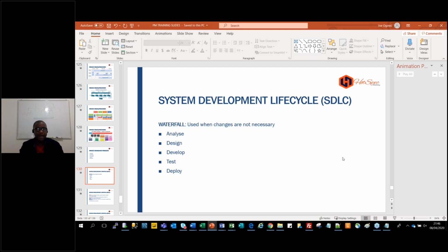Now, sometimes you're sure of an existing system. I'll give you an example. TikTok is an application a lot of people are using now. They did an application on Android, and they want to do it on iOS. They already know what to do: just replicate what's on Android to iOS. You can use waterfall for that. Why? Because you already know the end from the beginning.